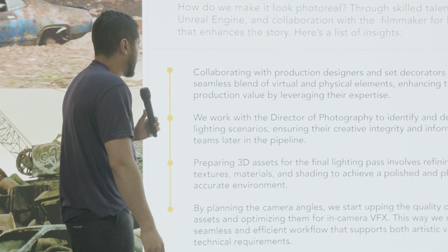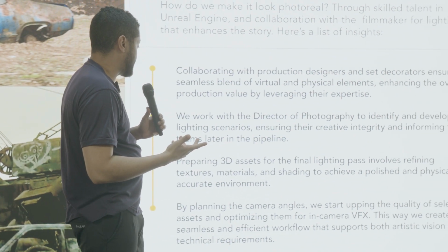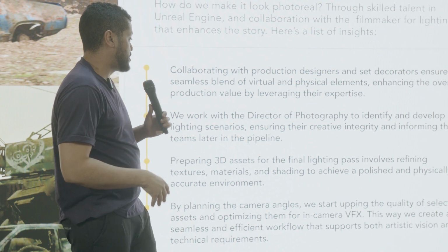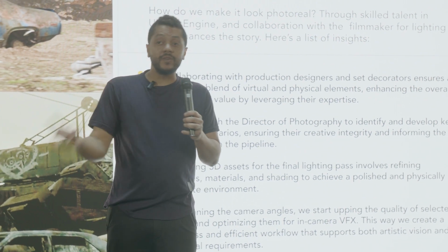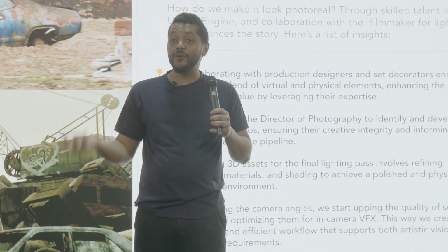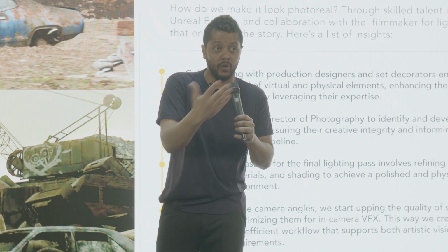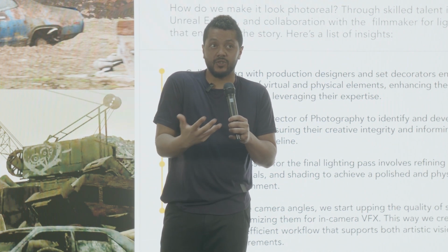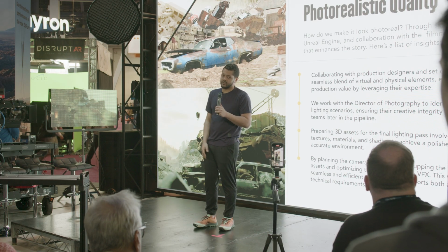And lastly, by planning the camera angles, we start upping the quality of selected assets and optimizing them for in-camera VFX. So this way we can create a seamless and effective workflow. If you know your camera, you know how much work you have to do. If you don't know your camera, naturally you're going to have to build more than expected because you just don't know exactly what those creatives want. So that's what the last one's about.